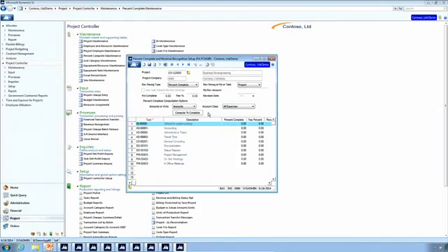So that could be based on production. We can also control what it looks at for the cost to determine the percent complete. So we can say all costs, or maybe labor is the main thing, or again, production units. So we have quite a few choices with revenue recognition.